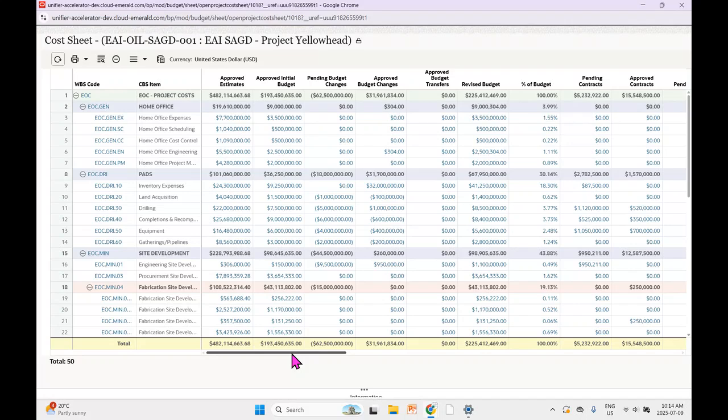Okay, so budgets come from, if you're a contractor, your agreement with the owner. Commitments are going to be things you're spending money on, so things you're buying for the project, so materials, equipment, and sub-trades. Your perspective will be different than the owner's perspective, but the tool works regardless of that. So this is going to be fed from all the detailed documents that Amy's going to start to show you. So this is not a typing-in form, although you can allow some typing in if need be.